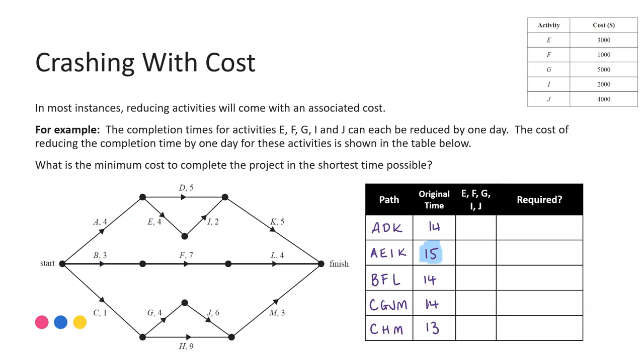Now I can reduce each of these activities, E, F, G, I and J. So anywhere I see any of those I can take one off for each of those activities. They can be reduced by one day. So going through and highlighting any of those reductions, first pathway, none of the activities appear. The second pathway, we have E and we have I. Third pathway, we have F. Fourth pathway, we have G and J. And the fifth pathway, again we have none there.